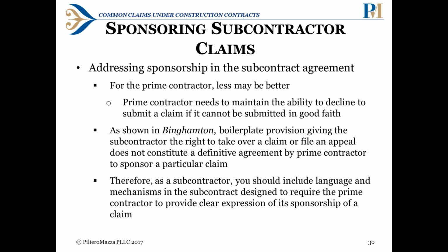As shown in Binghamton, a boilerplate provision giving the subcontractor the right to take over a claim or file an appeal does not constitute a definitive agreement by the prime contractor to sponsor a particular claim.